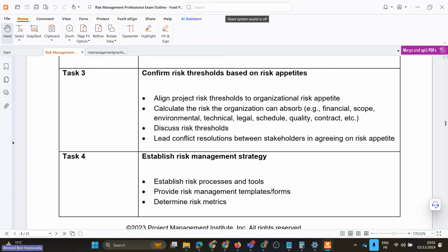risks. For example, if we have a sole source contract. What is a sole source contract? It's a contract with only one provider, even though there are multiple providers in the market, but our company deals only with that particular provider for whatever reasons. Could be historical reasons, etc. So here we're actually giving an opportunity for more risks to appear, because our company deals only with that particular provider, and this could create new risks for us.